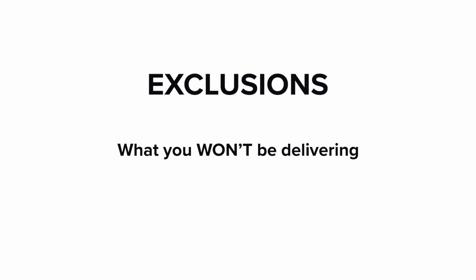Now that you've listed out everything you know you're going to deliver, it's time to spell out what you won't be doing. We're into the meat of this document now. Want to keep unexpected changes to a minimum? This is where you get that done. There are always great ideas for every project, but not all of these great ideas can be included in your project right now due to budget or time constraints. List those ideas or features or campaigns or whatever here so that your team can stay on track. You can always come back to these ideas later with a new project scope to address them.